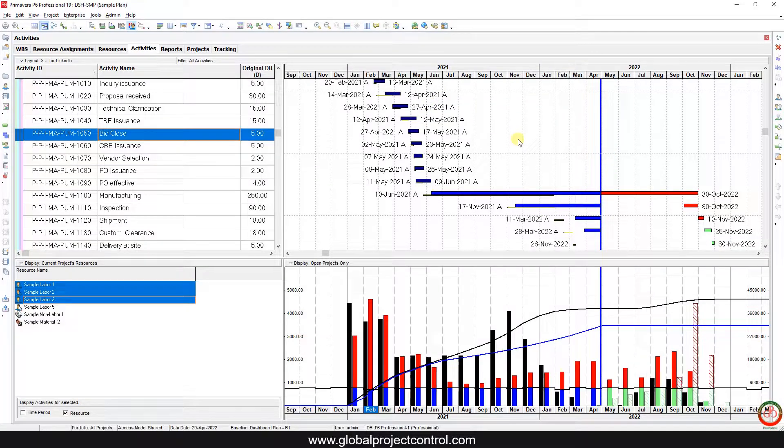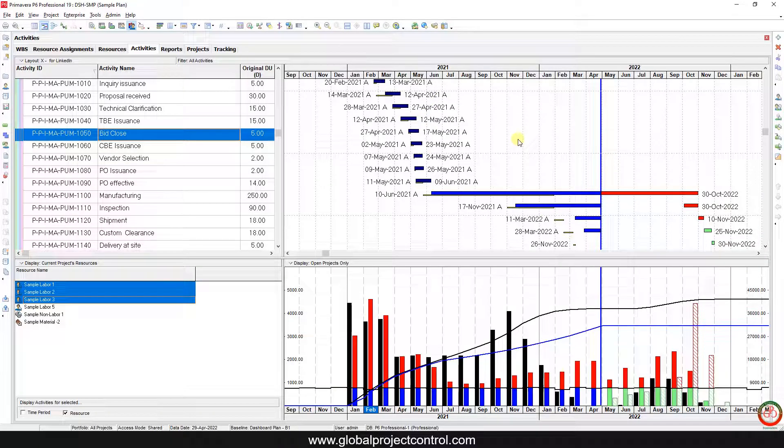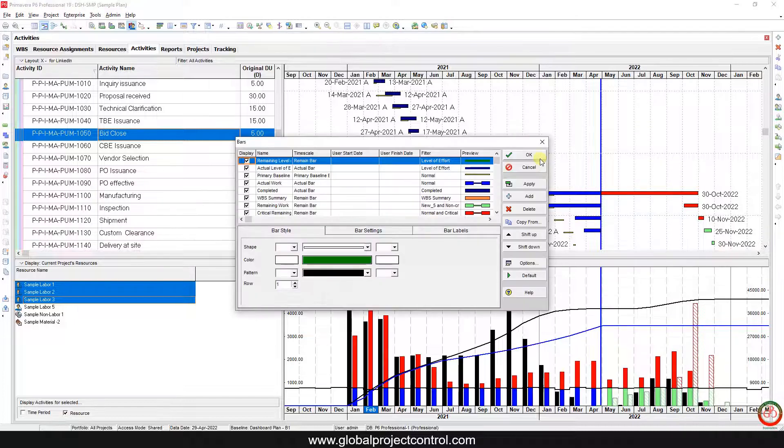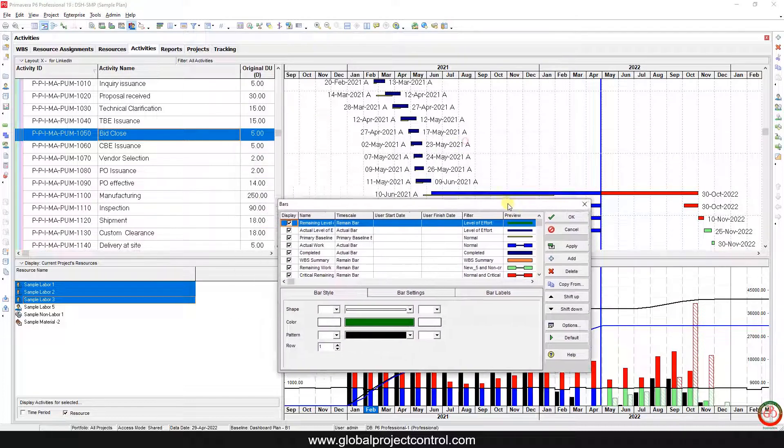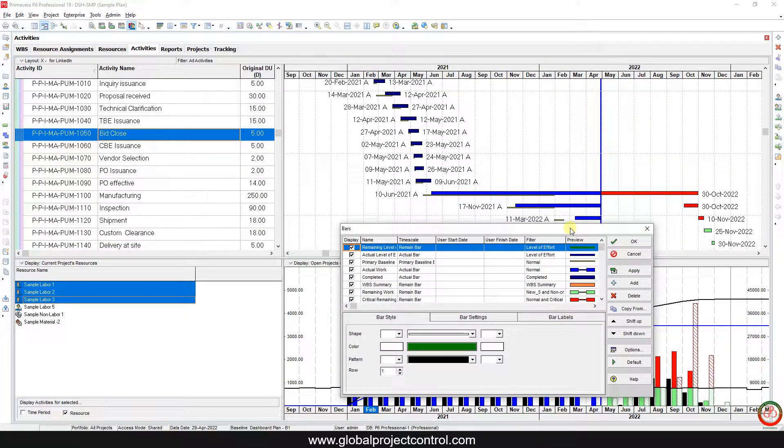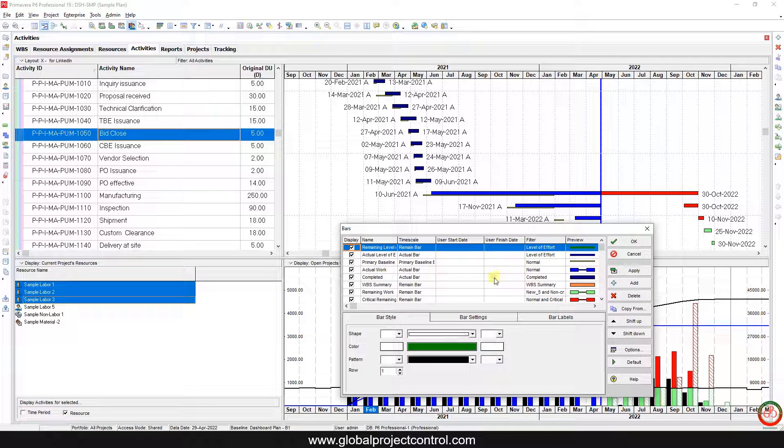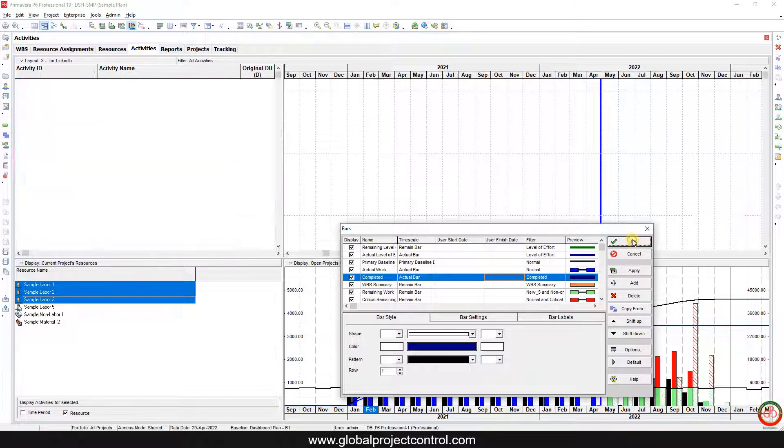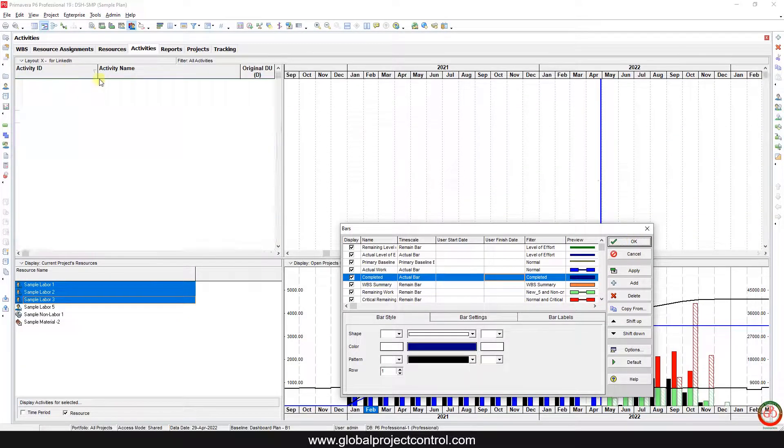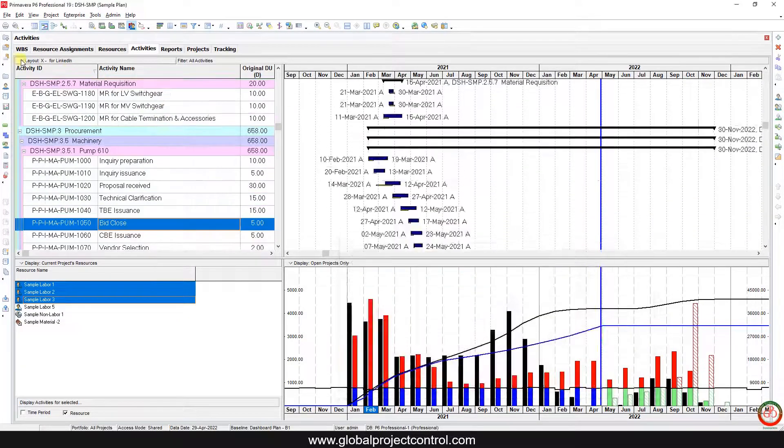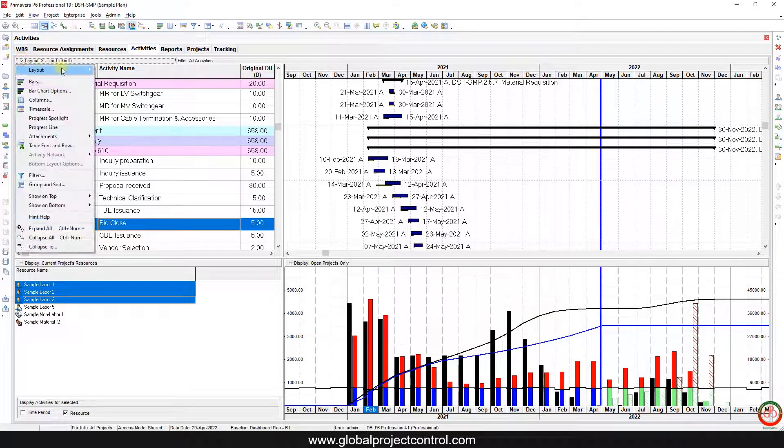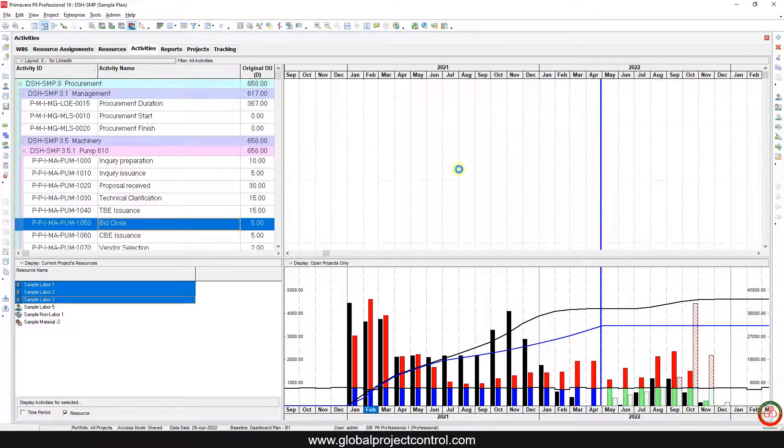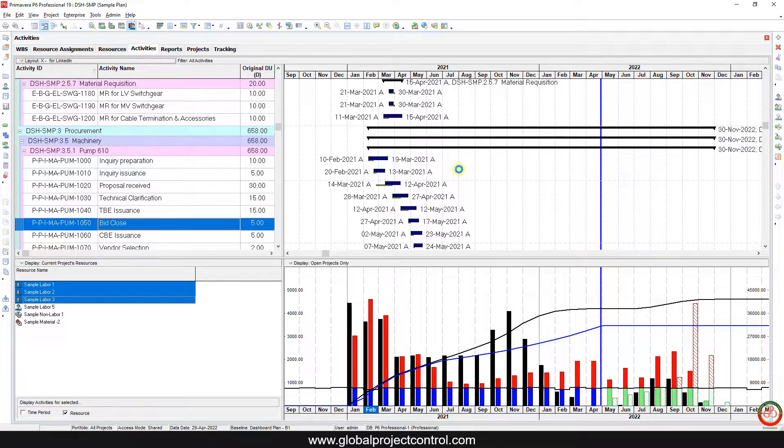If you want to customize it more, you need to come back to the bars section. Right-click on the Gantt chart, go to the bar section, and customize this item. Do not forget - after this change, you need to save it in your layout. If you don't save it, next time you won't have this setting.